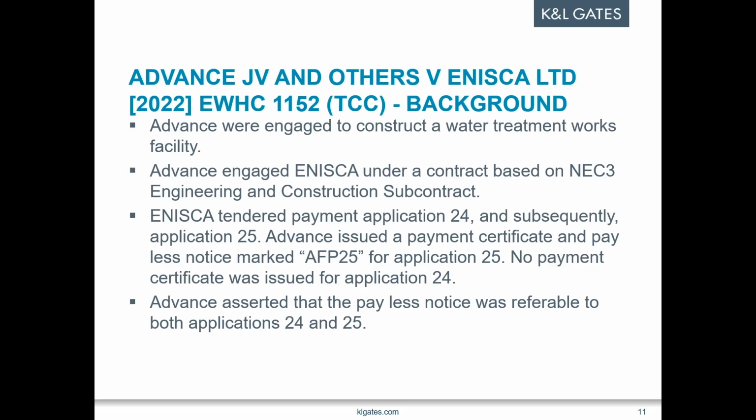And the sum considered to be due was supposed to be calculated by reference to the information included in application 25. Now, despite this, Advance said that the pay less notice could be relied upon as a valid notice in relation to application 24. They hadn't said it at the time, but then they seem to change their minds. They said the contractual requirements for the timing and content were met. It was sent before the 26th of November, which was when that deadline for the pay less notice expired.